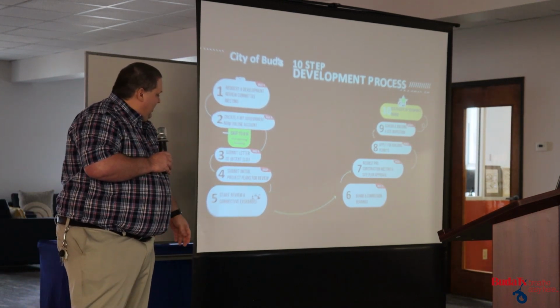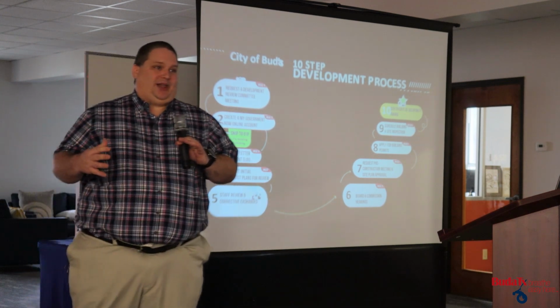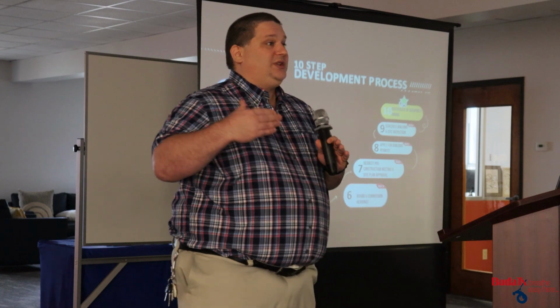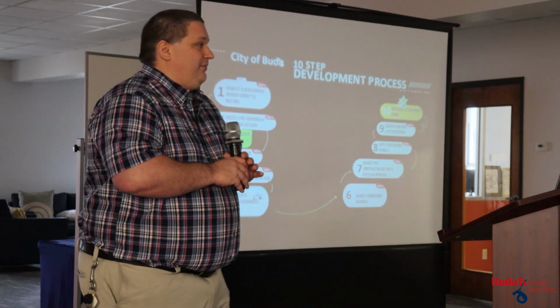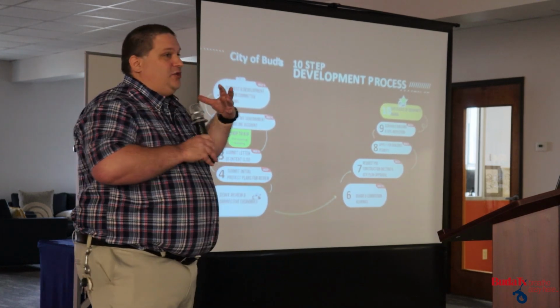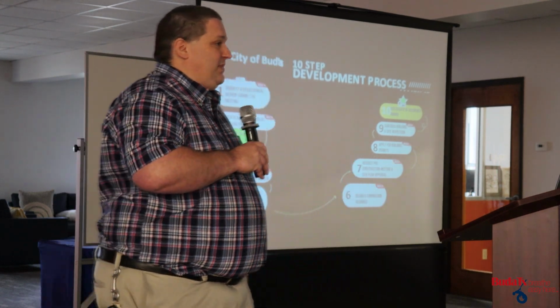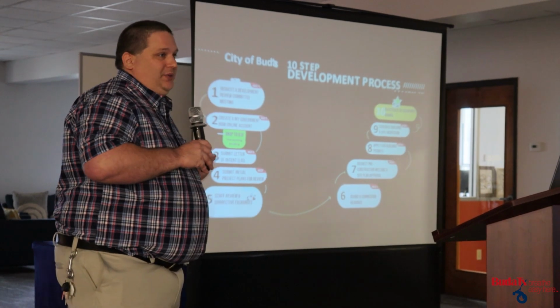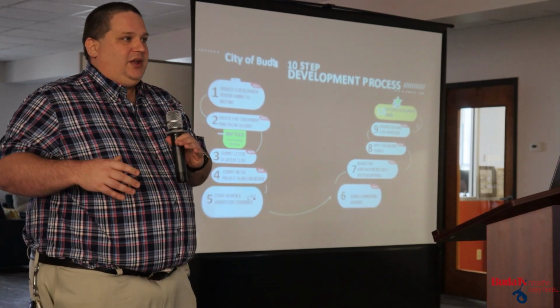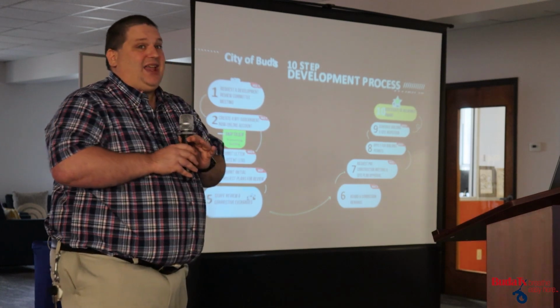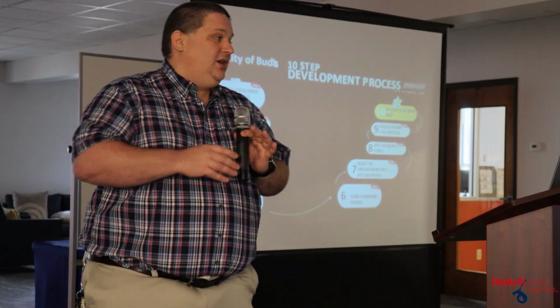The next step is you're going to submit your initial project plans. So this is if you're going to be doing platting, if you need to do site development, if you need to do a special use permit or specific use permit, if you need to go to HPC, that's where you submit your initial plans and staff reviews them. So for larger developments, this is the area of the process that can take a few months sometimes.